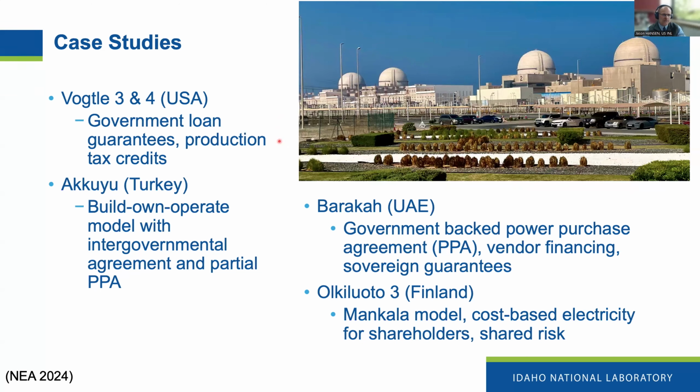In Turkey, a recent project used the build, own, operate model. So the entity who built the facility is also the entity who operates the facility going forward. That has to do with aligning the incentives in a way that is compatible with all those different stakeholder decision points that I mentioned previously. And once they built the plant, then they offered what are referred to as purchase power agreements, or contracts, you might say. So a contractual way to eliminate some of the risk by guaranteeing a market return.